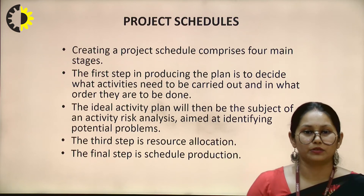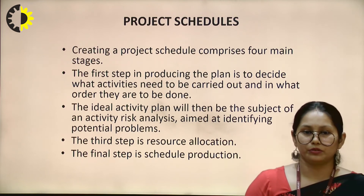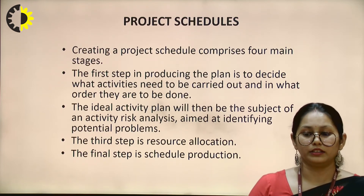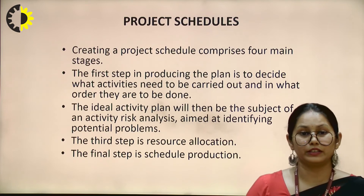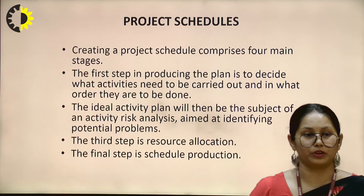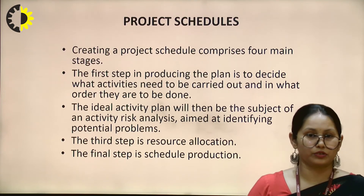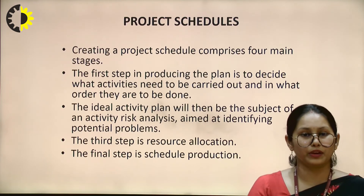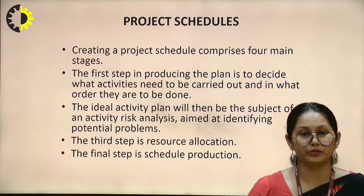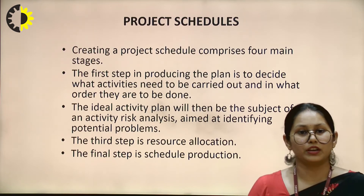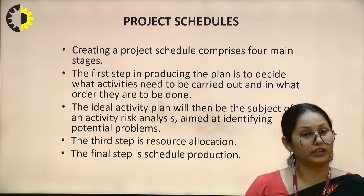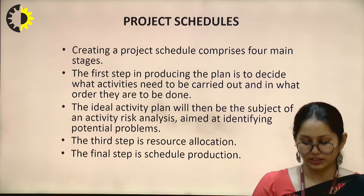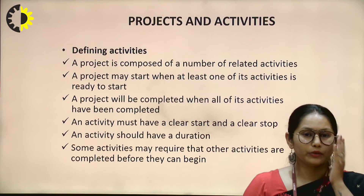The third step is resource allocation — finding out what various resources are needed and how they must be managed during actual implementation. The final step is schedule production — determining at what stage each module is produced, at what stage modules are finished, and how and when they are integrated. All these things need to be taken care of under the project schedule.